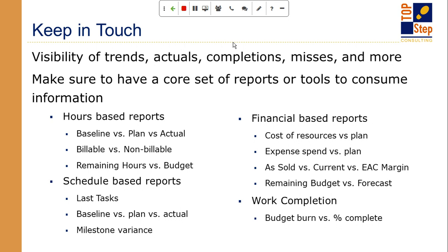And then finally, the milestone variance. So did we say we could try and get OpenAir up and running in 3 weeks? Well, it ended up taking 6 weeks. Why is that? What happened with that milestone? Is it because we just took longer to do testing? Is it that we were doing training? Is it that we scheduled it around July 4th, which was never a good time since everyone's on vacation?